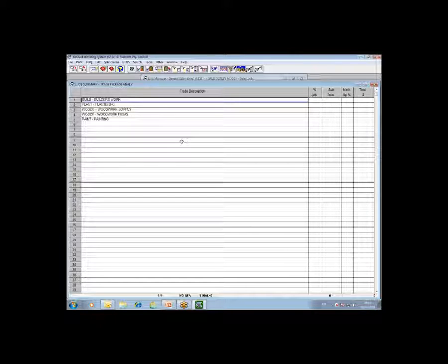So in this instance, as I say, just to point out that there are multiple uses for these resource codes. We're looking this morning just at resourcing a bill of quantities into trade packages for pricing with subcontractors. However, these resourcing codes or rate codes can be used in a number of ways to resource up individual component parts of rates, for instance, concrete, timber, labor of many different types.